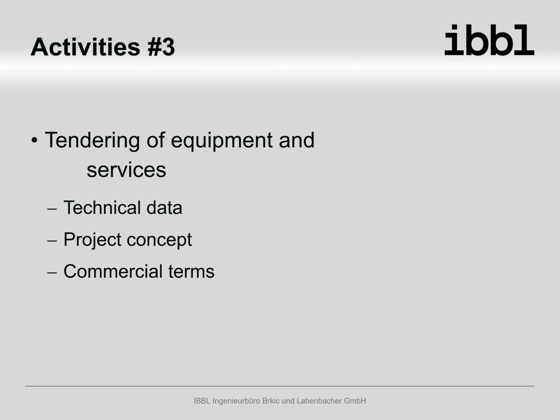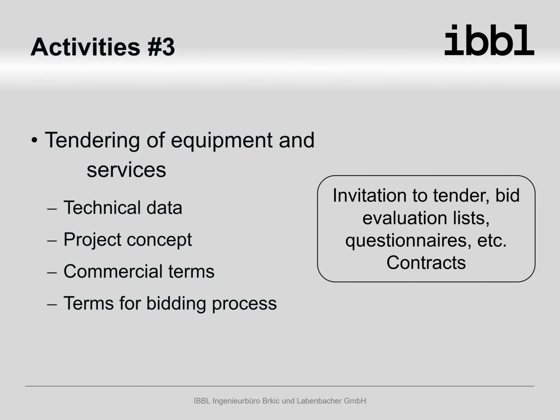Commercial terms for possible contracts are also part of the tender. Combined with the rules for bidding process, like submission date, addressees, bid bonds, these documents form an invitation to bid. All this is necessary so that the bidders are in position to provide a detailed, precise offer. Without going into further details of the tendering and the documentation produced, at the end, the contracts ready for signature should be available. The information to complete the basic engineering in all engineering disciplines are available and need to be implemented in the design.